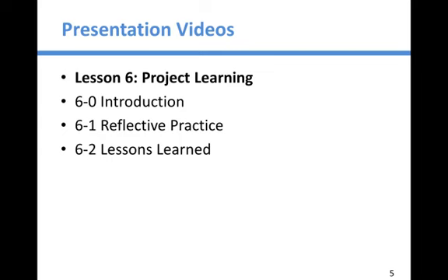Are there any opportunities for us that we can see that some indicators may not be producing the results that we want? Are there any changes we need to make in the approach, in the schedule, in how we're managing the project? And out of that comes all of our lessons learned. And the message here is that those lessons learned, they need to be incorporated during the life cycle of the project. It's not something that happens at the end of the project that eventually becomes a document that nobody reads, but it's a living document that should inform the project while they're making progress.